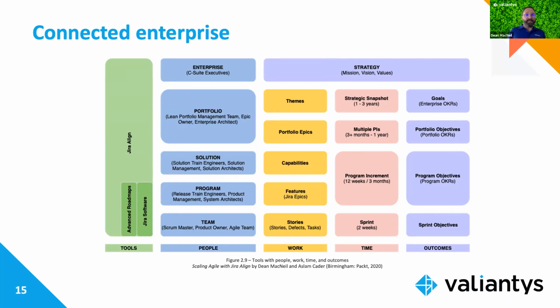You've got great visualizations. Look at that dependency visualization alone. That has helped countless organizations realign, because when you first start an agile transformation, your tendency is, hey, let's group our program teams into functional areas, like our old waterfall way. Well, you're going to see how that's not good, because your dependency wheel is going to look like a dense spider web, and it's going to be all red and crazy. And that has actually helped educate organizations that, hey, we actually need to align around value, not around functional. We need to be cross-functional agile release trains and cross-functional tribes capable of delivering features within business quarters with minimal external dependencies. And then you'll see that dependency wheel goes from that dense spider web down to something quite manageable. So all of these visualizations are helpful for your stages of the transformation journey, okay?